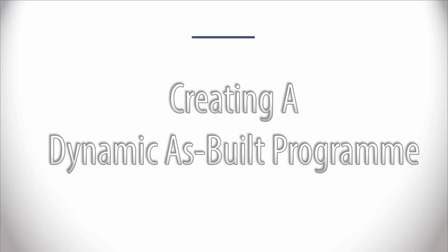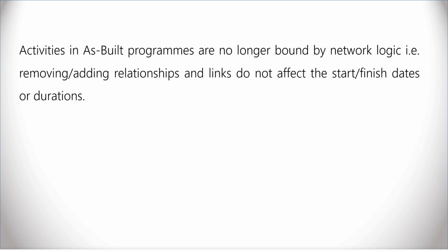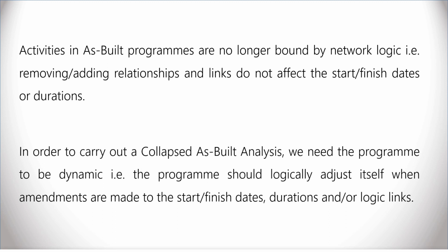Creating a dynamic as-built program. Activities in as-built programs are no longer bound by network logic. In other words, removing or adding relationships and links do not affect the start or finish dates or durations. So in order to carry out a collapsed as-built analysis, we need the program to be dynamic, i.e., the program should logically adjust itself when amendments are made to the start or finish dates, durations, and/or logic links.